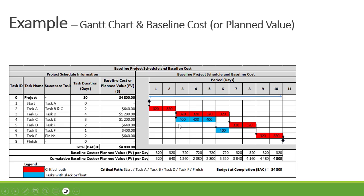Let's calculate our baseline cost. Task A has a cost of $640, evenly distributed over 2 days: 320 and 320. Task B is $1,280 evenly distributed over 4 days: 320, 320, 320, and 320. Task C has a cost of $1,200 over 3 days: 400, 400, and 400. Task D is $640 over 2 days: 320 and 320. Task E is $400 over 1 day: 400. Task F is $640 over 2 days: 320 and 320.